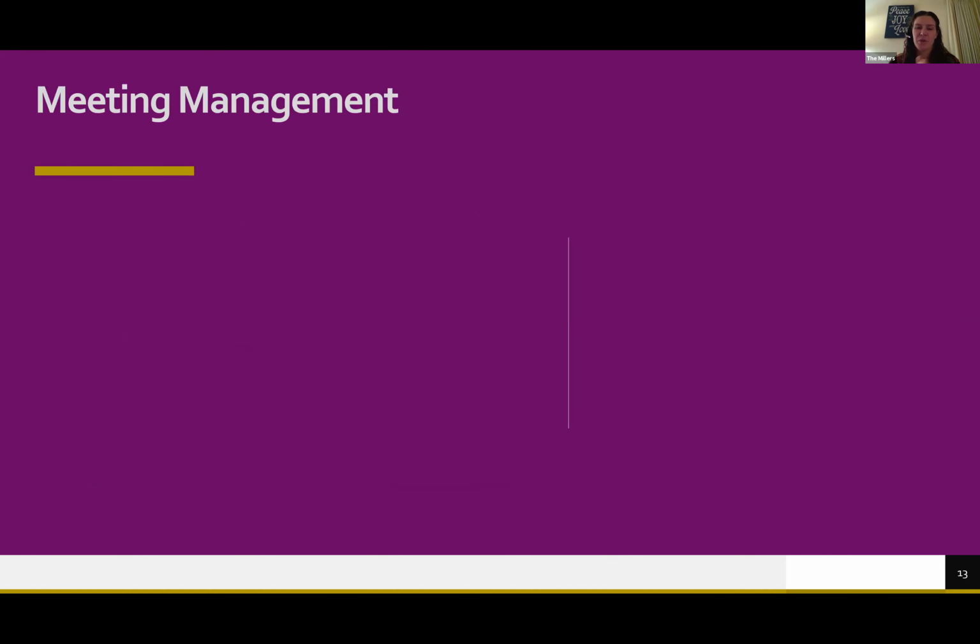All right, so communication, a lot of communication happens in meetings. So let's take a minute and talk about meeting management. There are 5 types of meetings that I typically run in a week. There are stand-ups. These are super short, sweet, time-sensitive updates, looking for like, hey, are work packages moving forward? Are there any issues or risks that I need to address for you? No? Okay, great. See you tomorrow. Stand-ups, short, sweet, typically 15 to 30 minutes.